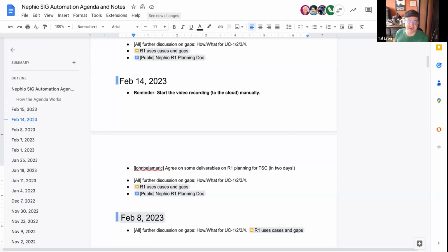They're draft issues, right? And as we move ahead, we'll decide which ones are priority and which ones aren't. And we can maybe tag them. For example, we can set for some issues, say, you know what, this is interesting, but maybe it's post R1, and we tag them with R2 or something like that, or TBD or similar.